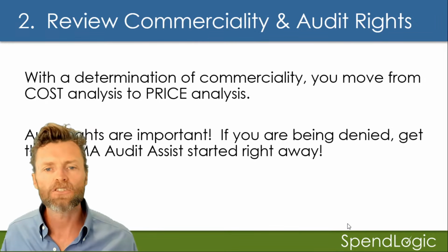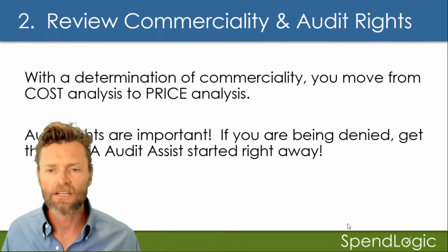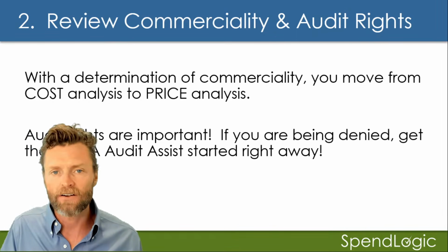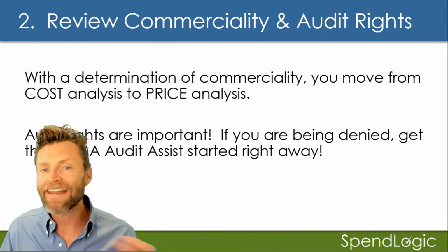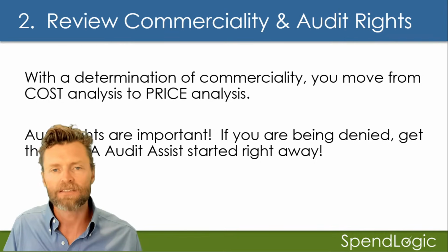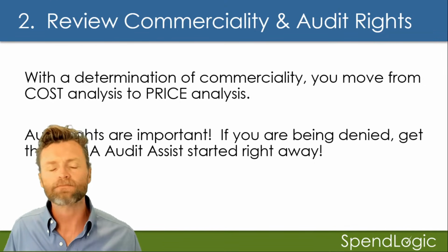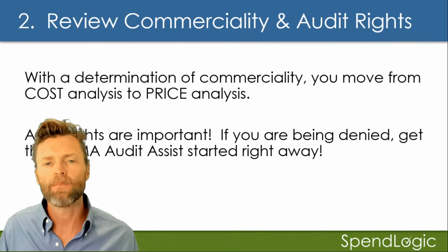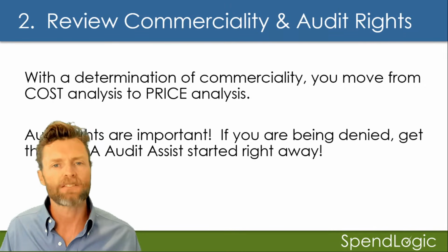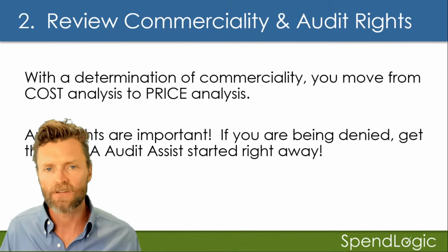Okay, my second thing is to review commerciality and audit rights. So going back to understanding whether a cost analysis is required or not, one of the get out of jail free passes, so that you don't have to go down this path, is determining the item to be commercial. Most companies that I've worked with really rely on the supplier to assert commerciality, okay?